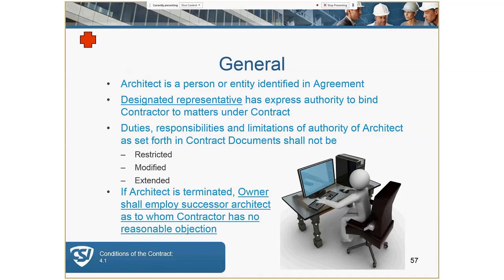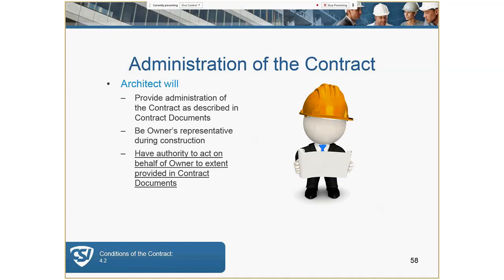The architect will be identified in the agreement with a designated representative with express authority to bind. If the architect is terminated, the owner shall employ a successor architect to whom the contractor has no reasonable objection. The architect's duties include providing administration of the contract as described in the contract documents. The architect will be the owner's representative during construction and will have authority to act on behalf of the owner to the extent provided in the contract documents.